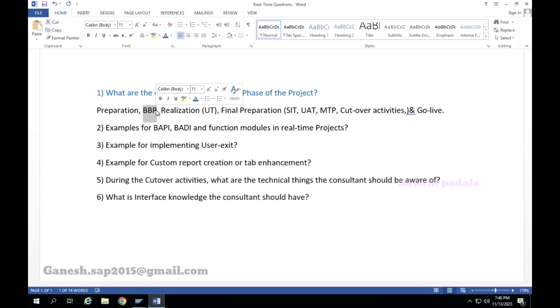Multiple times we explain to them, and the business will not understand the to-be processes properly. After the blueprint and flows are prepared, they will ask a lot of questions. So with questions and changes, we again change the flows, whether you are using MS Visio or any other tool, then update it. We take multiple versions, and they will take a lot of time. Again, you are giving a new version, they will take three or four more days to review.